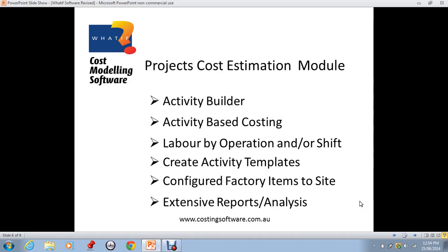A project can be any venture with a defined start and finish date, and with activities that can be defined and scheduled. Activities are either detailed or header activities. Detailed activities are costed using a bill of materials, labour operations, subcontract and other cost operations. All operation quantities required, including materials and labour, can be calculated by using cost drivers specified within each detailed activity.